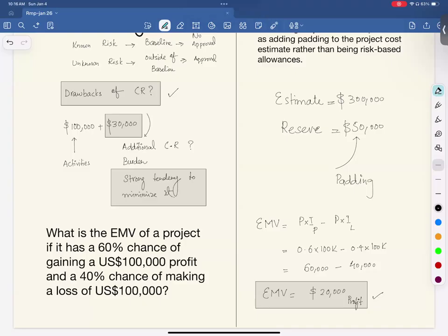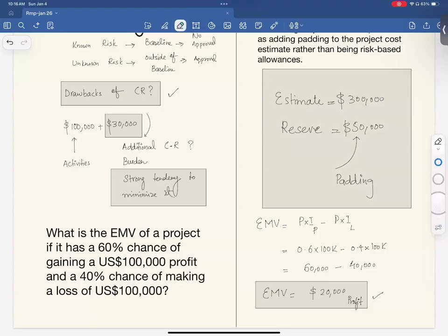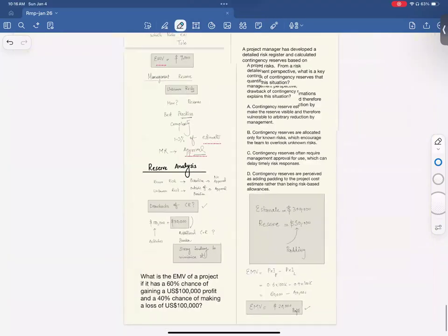So, as my understanding is that for management reserve, there is no certain calculation. It's on the historical. So historical is calculation, right? It is based on past experience, based on some thumb rule. So you're using some basis, right? So when you don't have any basis, that's what we call padding. When you're using some basis, that's not padding, okay?